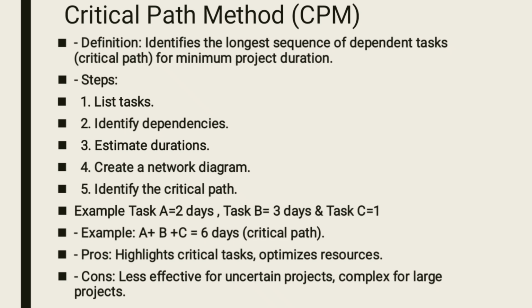The advantage of using this one is that it highlights all the critical tasks. So all the critical tasks are properly highlighted. There is efficiency in terms of resource usage. The disadvantage, it is less effective when you are on projects which you are not sure about the outcome and how their progress is going to be. The other one, it is complex for larger projects. That means this one is good for smaller projects.